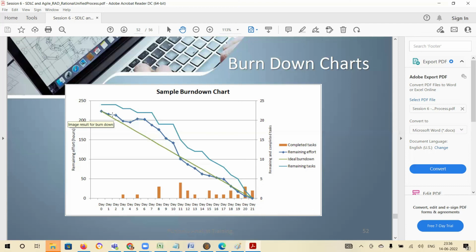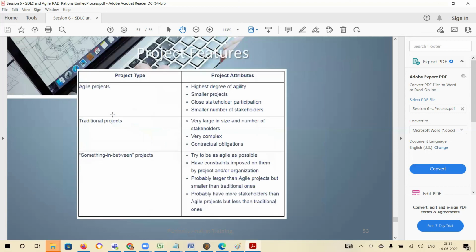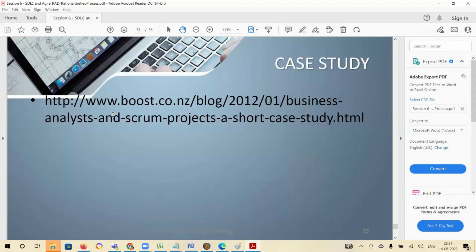Okay, the last one is called remaining task. So this is again a number. First and last is number of tasks. So on day one you have 300 tasks, and you completed 2 tasks, so on day 2 the remaining tasks will be 298, right? So that's how you're going to measure, and this is the best way to measure agile workflow, and you can of course reuse it for your own purpose too. Is it clear? With that, we finish our topic.